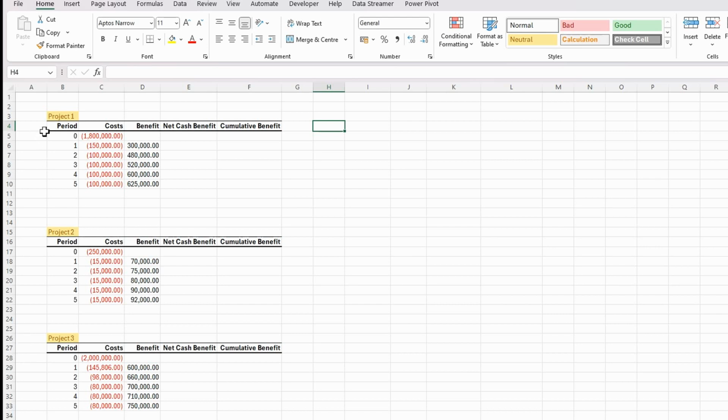So what we can see here is we've got the financial periods, so year 0, 1, 2, 3 and so on. And then we have our cash flows, so we have our costs, so initial cost up front, and then possibly ongoing costs. So for example, if you've created a department, then you will need budget to run that department, or there might be some ongoing service costs that you'll need to pay on an annual basis. And then we have the expected financial benefit here as well. So again, from year 1 here, we've got benefits in here as well.